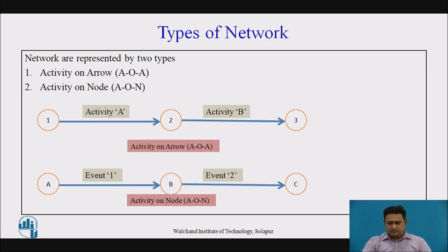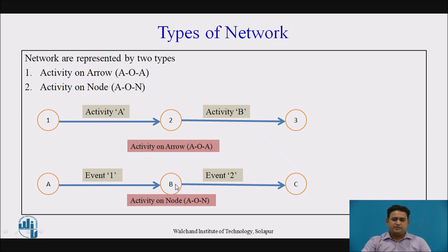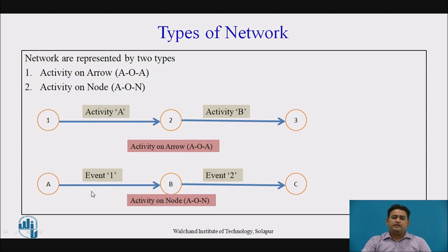Now the types of network. There are two types of network: activity on arrow and activity on node. In activity on arrow, the activities are represented above the arrow — or you can say activities are represented by the arrow — and 1, 2, 3 are the events. In activity on node, the nodes represent the activities: A, B, and C are activities represented by the nodes, and events are represented by the arrows. These are the two types of network technique diagrams.